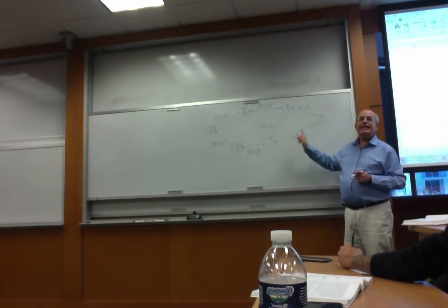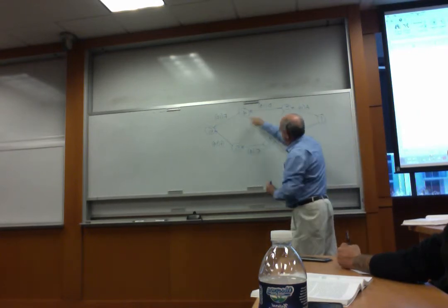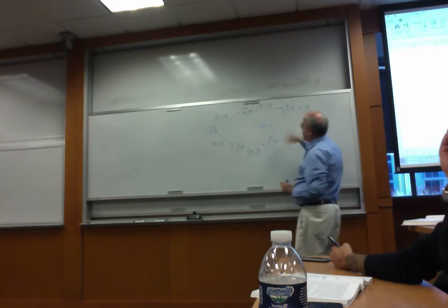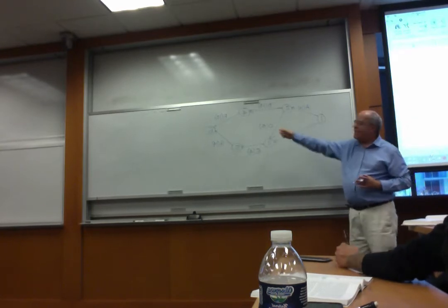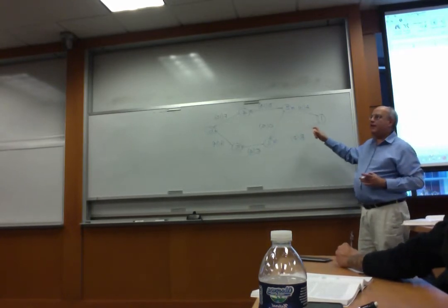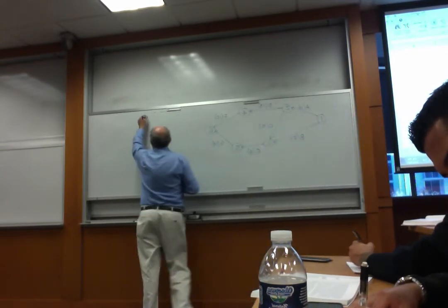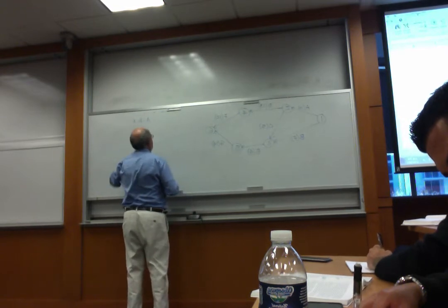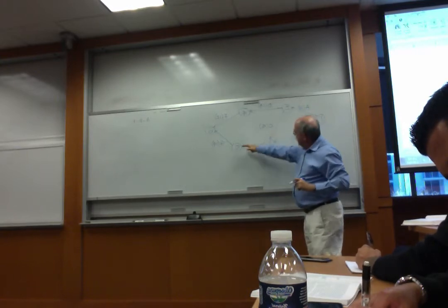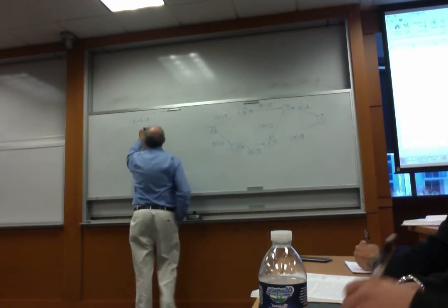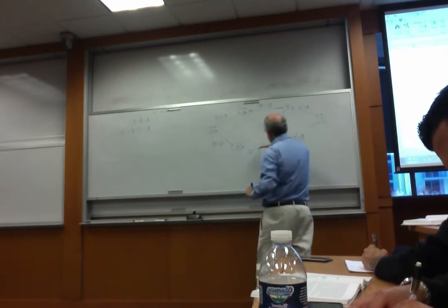Let's enumerate them using the letters, the activities. A path, as I said, is a continuous walk from 1 to 6. So how many different ways do we have to get from 1 to 6? Three. One way is A, B, F. Next, another one is A, C, E, G. One more, B, E, G.